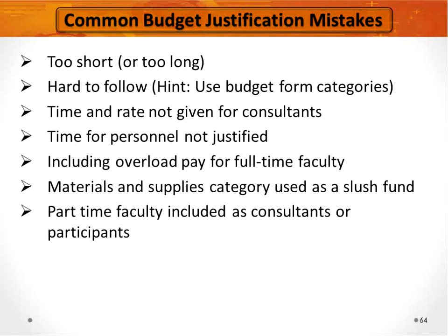And then part-time faculty, again, they're not participants. Usually they are not consultants. They are employees of your institution. So you include them appropriately using the pay rate that they are paid by your institution. I think that's most of it. I mean, it really doesn't work to try and pad your budget. You're going to get called on it, but you want to be accurate.